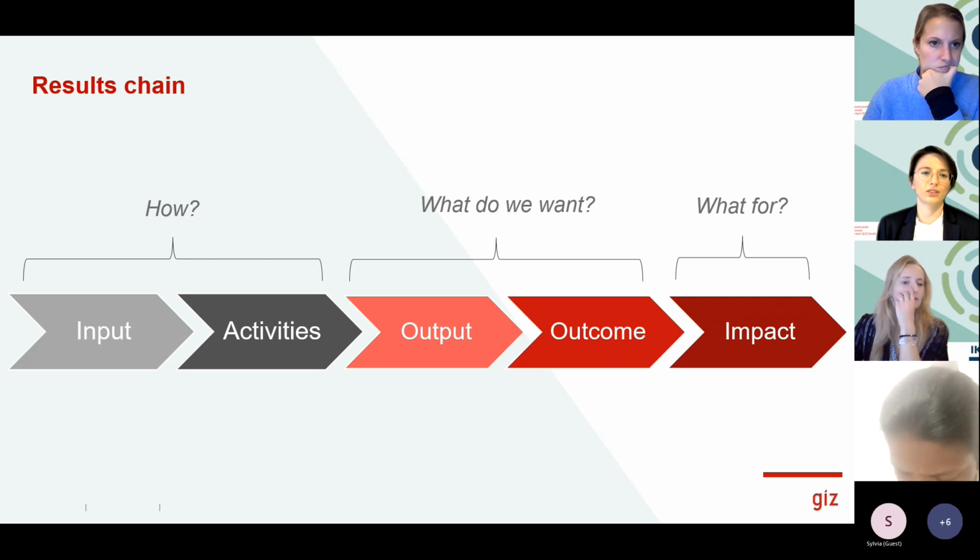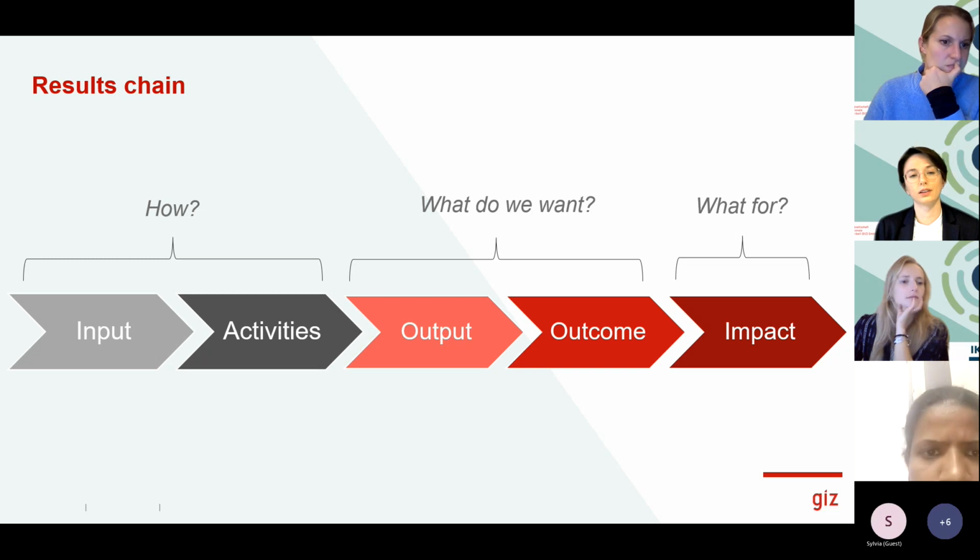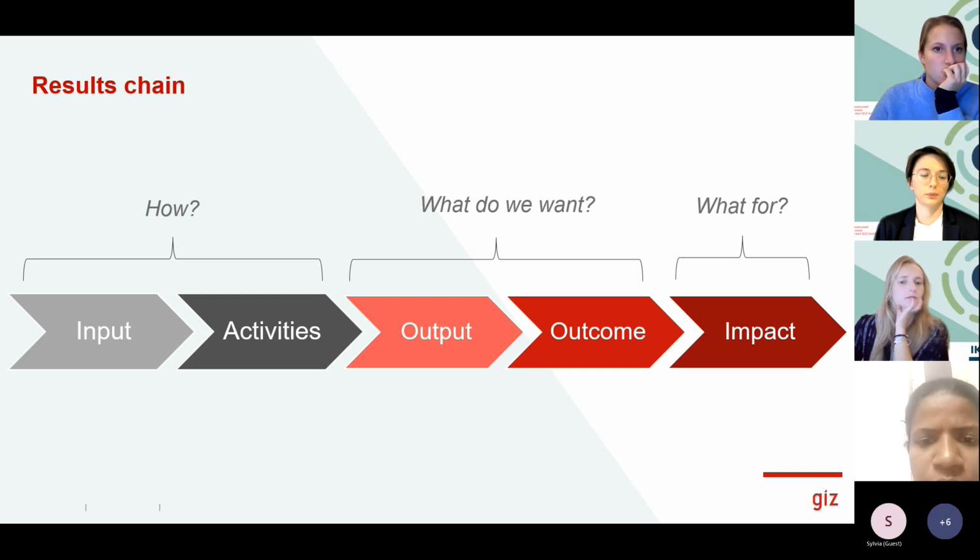So how do we reach the output or outcome level of the project objective? Outputs are built on inputs and activities. You invest different things like time or money. Those are your inputs. For example, the available human, financial, or material resources like person days of a consultant, volunteers, funds, equipment, all of that.